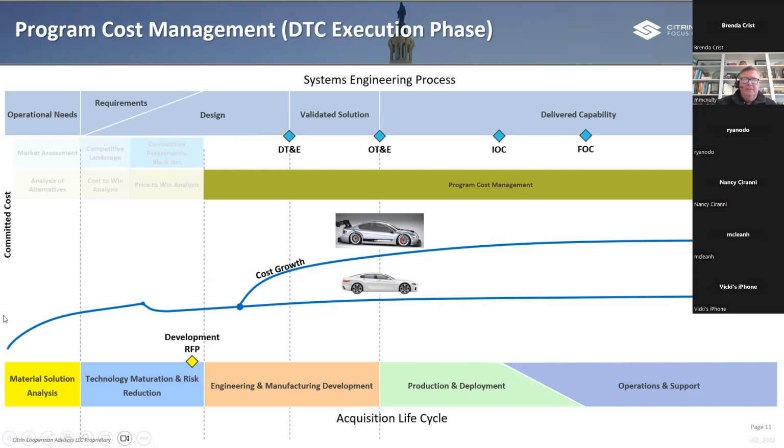And the discipline that was in here, the discipline that was put in the proposal, and all the hard work and the cost analysis and everything I've been talking about, that's kind of gone out the window if nobody picks it up and grabs it and gets their arms around it again. And it won't be very long if you're not careful. The engineers will go up here. They'll go right up into that new cost curve because everybody wants the 911. Everybody wants the Porsche, right? That's fun. And if you're not careful, you got a program that's out of bed right away. So I'll just let you know that this is the overall picture of design to cost and why it's so important in systems engineering and cost control and program management.